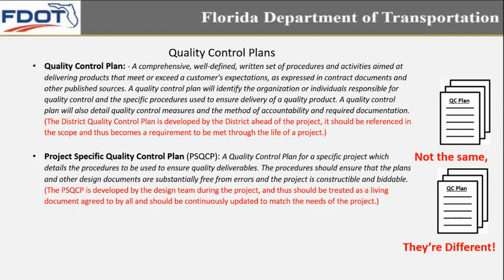There are times throughout a project you might need to perform an additional phase review, and you need to adjust your quality control plan to incorporate that. Or a project is accelerated, and you need to maybe combine your constructability, biddability, phase 2 and phase 3 into one phase review, and you have to retweak your quality control plan to make sure that's properly taken into account.